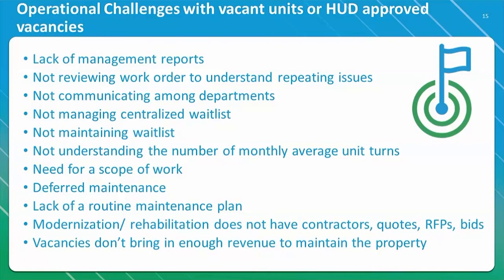We need most likely a scope of work when there is more work that has to be actually performed inside the unit, and it's not just about the maintenance team doing it, but you need to now put out a bid or an RFP for something that you see is a generic issue, and you need to broaden the scope and bring an expert in to help you get it done faster, or when you experience an exodus of maintenance team members because potentially they go off the market and for 50 cents more leave your environment and work for somebody else.